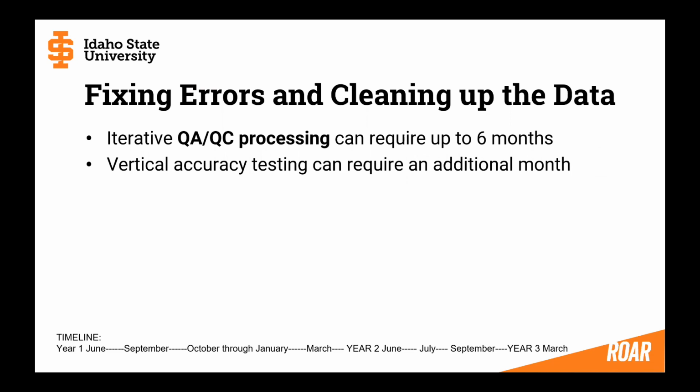Because otherwise what may happen is you say, yeah, no, give me the data right now. And you get it, and then maybe a month, 2 months, 3 months later, you find out, oops, we found some errors and there is a new delivery 2 for your project area with corrections to the vertical data, which is the important stuff, right, for LiDAR.